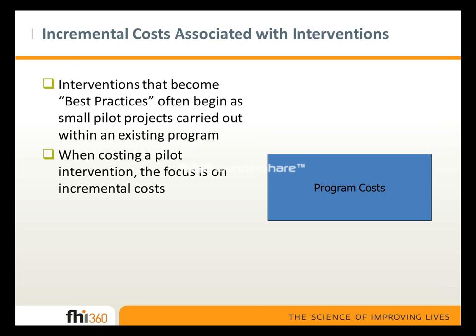So let's focus on some technical details briefly around costing pilot projects. First, which costs should be considered? Many interventions that ultimately become best practices often begin as small pilot projects carried out within a larger program. And in family planning, there are a lot of examples of this, many of them particularly in the integration field, where we've seen family planning integrated into MCH programs, HIV programs, and other non-health programs such as microfinance. So when we're costing a pilot intervention, the cost of the existing program doesn't really apply. The focus is on the incremental costs that come with the intervention.